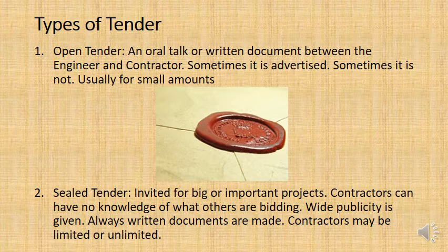And this means that you need to write out very clear, detailed specifications on what the work is. You also need to talk about what kind of contract will be awarded, what kind of conditions there will be. Just as we talked last week, you need to include all of that in the tender documentation.